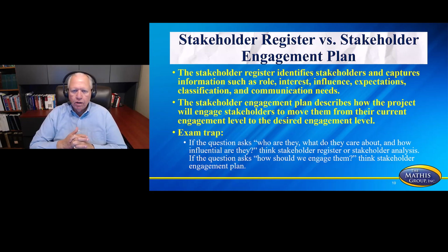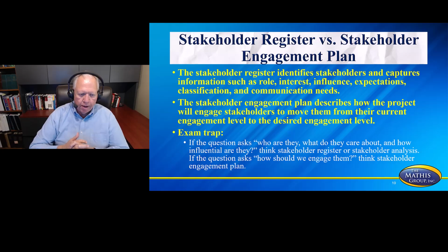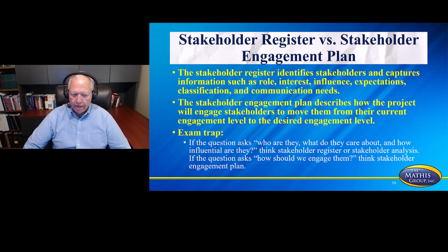Stakeholder register versus stakeholder engagement plan. The stakeholder register identifies stakeholders and captures information such as role, interest, influence, expectations, classification, and communication needs. The stakeholder engagement plan describes how the project will engage stakeholders to move them from the current engagement level to the desired engagement level. The exam trap that you want to watch out for: if the question asks who are they, what do they care about, and how influential are they, think stakeholder register or stakeholder analysis. If the question says how should we engage them, think stakeholder engagement plan.